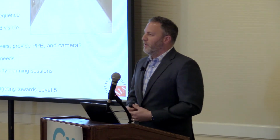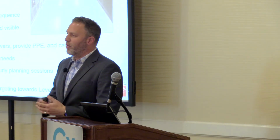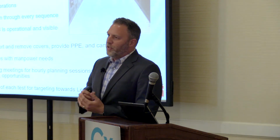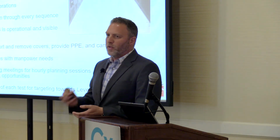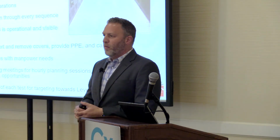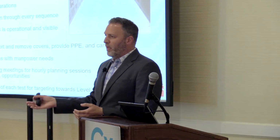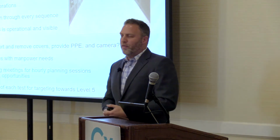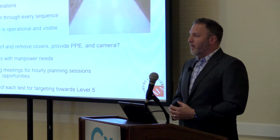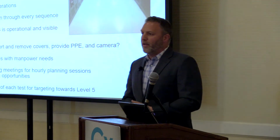Script out each day's activities with manpower needs. Run daily meetings with your CMGC and go through the commissioning process for that day. We're going to test a generator, we're going to test 2 UPSs, 4 static switches, and 16 RPPs. That's our plan for today. We're going to do it from 8 a.m. to 4 p.m., and we're going to do the next shift from 4 p.m. to midnight. Get into that granularity. Let everybody know so that they can plan their day and their resources.